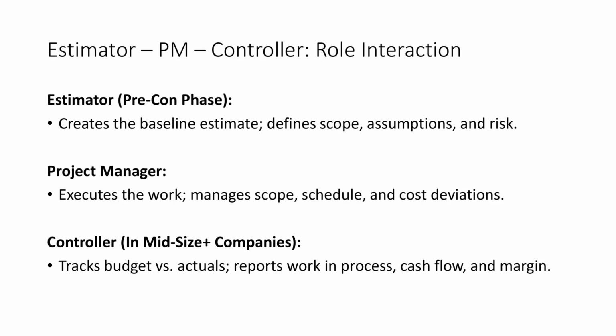And that person is responsible for capturing the real, actual cost, comparing it with the baseline estimates, controlling the deviations over time, and informing all others on the team about what strategies they have to consider in order to meet the deadlines in the project. So for instance, if the project is getting late, they have to bring in more crew to get the work done so that the project doesn't have a significant delay.